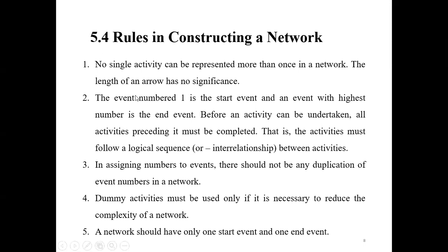At the same time, event number 1 is the start event, and the event with the highest number is the end event. Whenever we start the project, the starting number is the first event, so that's the start event. Then the highest number is the ending event.